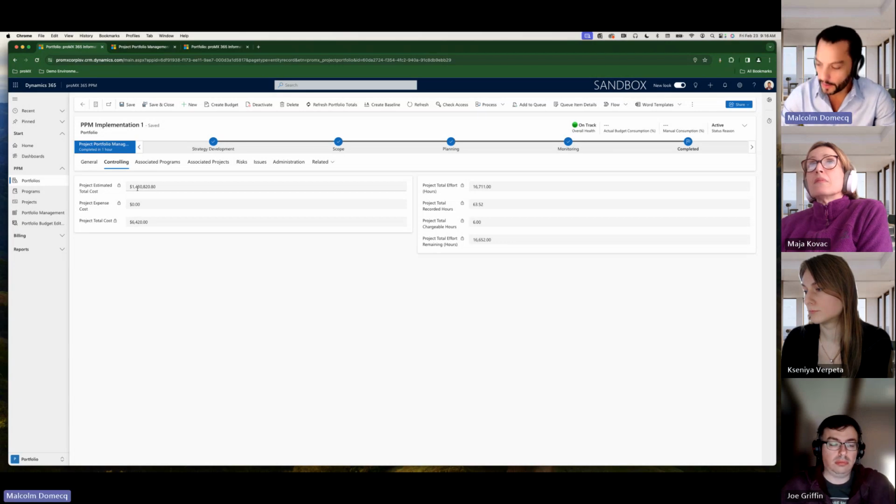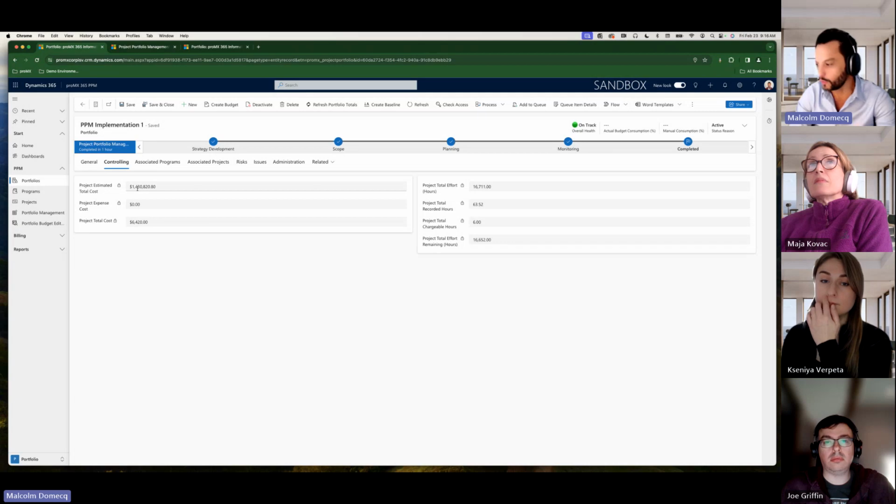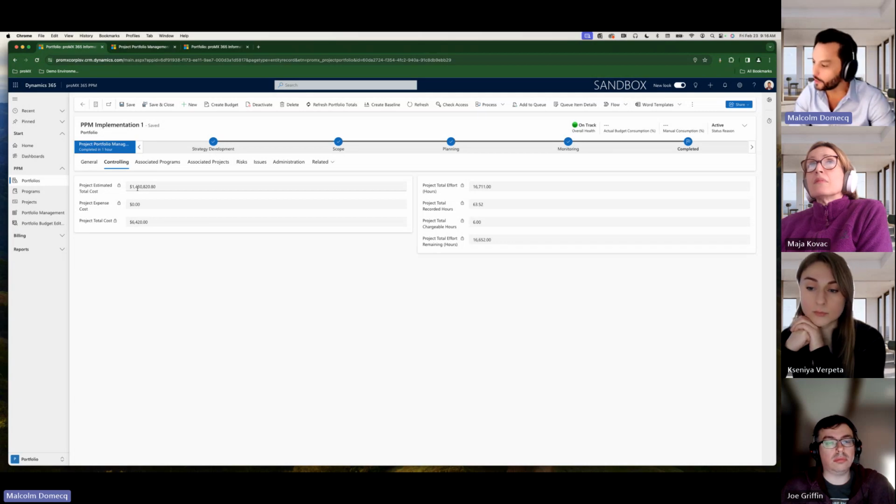Okay. There is always a discussion with the customers at which point you want a time entry to be accounted or accrued as a cost. Is it when it is in draft or is it when it is approved? Right. So that's a famous discussion that you might have, and we have ways to work on that as well. Okay. So then it's going to take me to the estimated total cost, time entries, and cost entries.